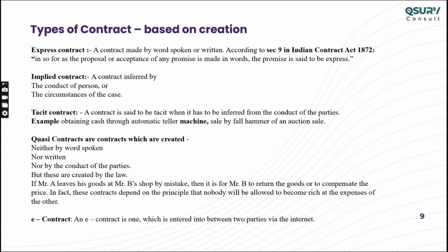At this stage, the court will say, dear client, there is work he did for you. You got benefit out of it. At the same time, you haven't stopped him either. That means you are getting the benefit out of it. When you get a benefit and you require that benefit, it's called a quasi contract in place, even though nothing is expressly stated.